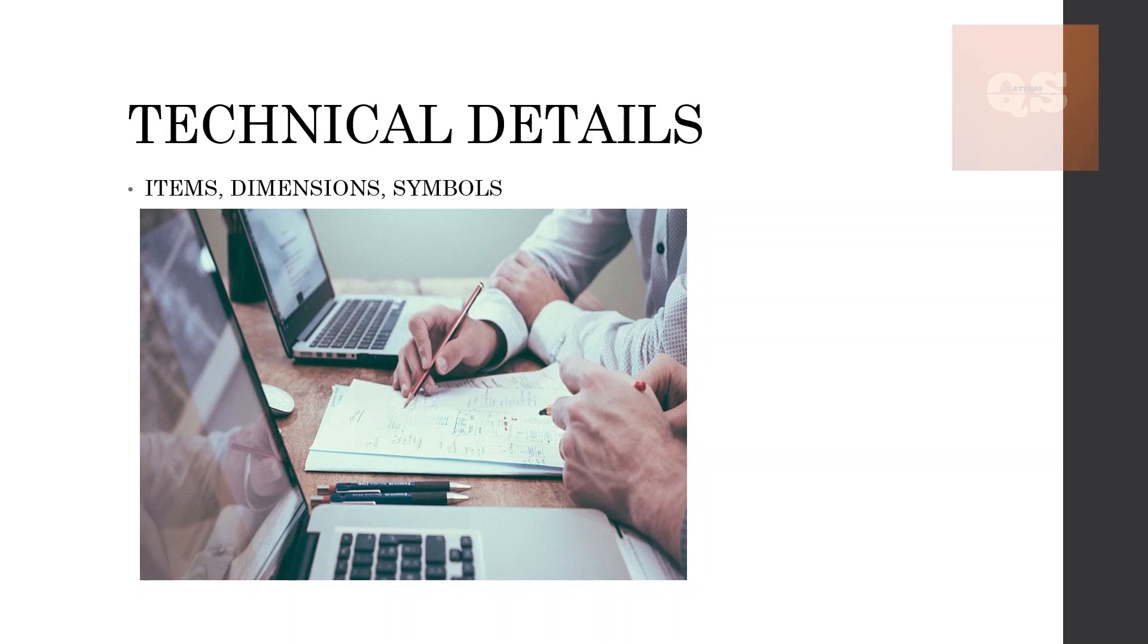And again there might be some symbols shown in the drawings, but usually there will be legend drawings available. But in some cases, all the symbols might not be shown in the legend. These need to be known prior to your takeoff so that you can include the item description in your takeoff sheets, and then that needs to be included in the BOQ.